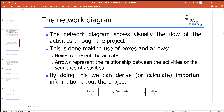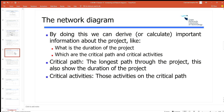The network diagram visually shows the flow of activities through the project — a nice way to see how the project goes. It uses arrows and boxes: the boxes represent the activities and the arrows represent the relationships between those activities. A simple example shows three activities: I dig the hole — one day; I pour the concrete — one day; I build the wall — and it's finished. But I can't pour the concrete if the hole isn't finished, and I can't build the wall if the concrete isn't finished. That's the flow through the project.